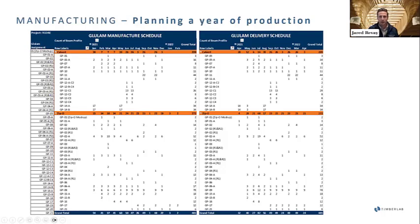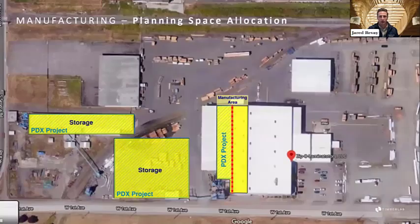And what that meant was if you're going to manufacture in batches, you need to create a storage plan. And working with the manufacturer to find the space within their facility to dedicate to this project. And so working with our manufacturer Zippo on this project and going to them to say, hey, look, we need to take over like half your facility for the manufacturing, and then we need to take over half your yard for storage. That's not an easy thing to do, especially with a company you're working with for the first time and on a project that's the biggest project for both of you.